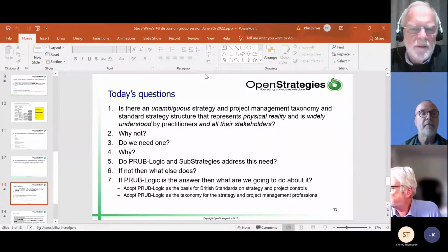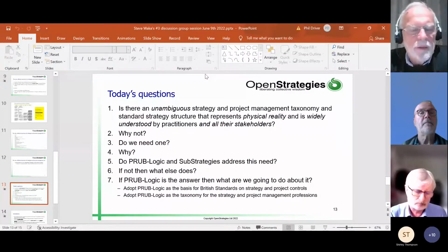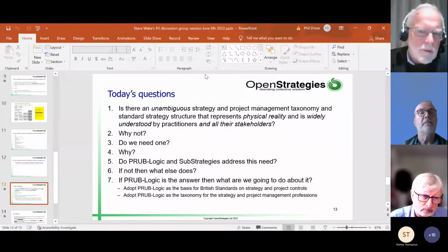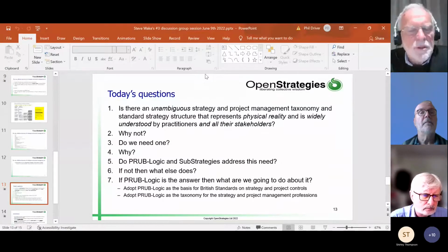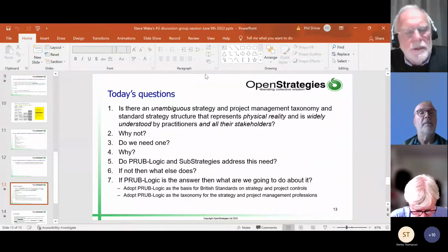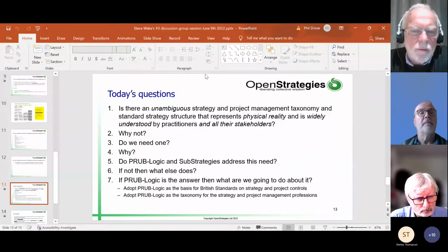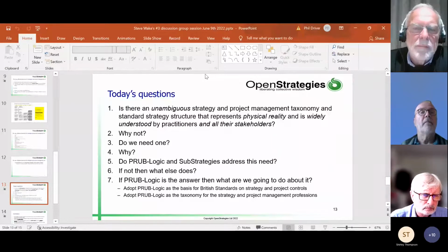What you'll find is that there's a dozen different goals, and that's actually okay. So we then end up with maybe a dozen sub-strategies with subgroups of stakeholders clustering around each sub-strategy. They can all see what every other cluster is doing, and they work in parallel. But as soon as you try and get everybody to agree on a common goal, that's a death to a large-scale community-type project, because common goals don't exist. They exist as subsets of goals for different subgroups.